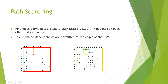These couplings represent loops between tasks. Task L depends on task J, and task J depends on task L — so that's a loop or cycle between the two. This coupling represents a feedback loop between tasks L, J, F, and I.